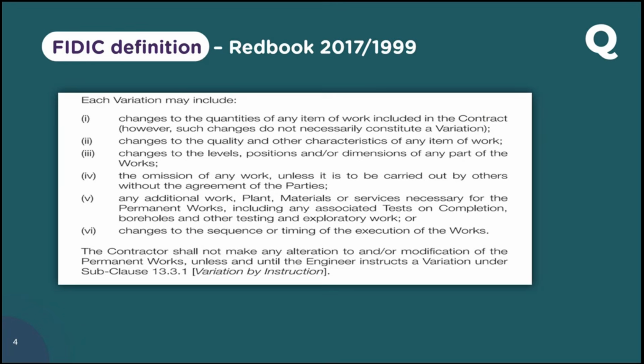Fourth question, is there any omission of the work? Fifth question, is there any additional plant or material or service requirement? Sixth question, is there a change in sequence or timing of execution?